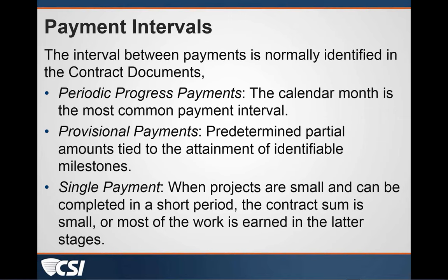So that could be set to where at building dry-in, there's going to be a payment. At startup of HVAC systems, there's going to be a payment. So you identify milestones and tie the payments to those specific milestones. A single payment is on small projects. I'm sorry, Jim, are you?